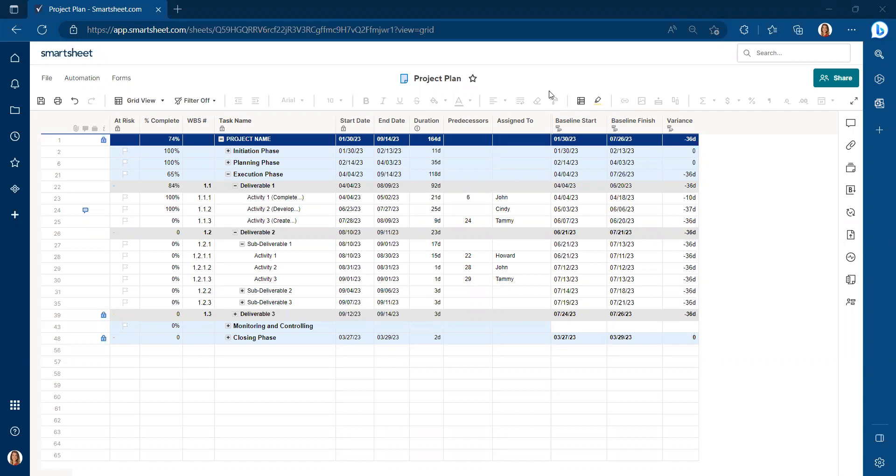Therefore, once we're done with all of our project planning, if we're able to set our project baseline, when we're three months into the project, we're going to be able to say, are we ahead of schedule or are we behind schedule?